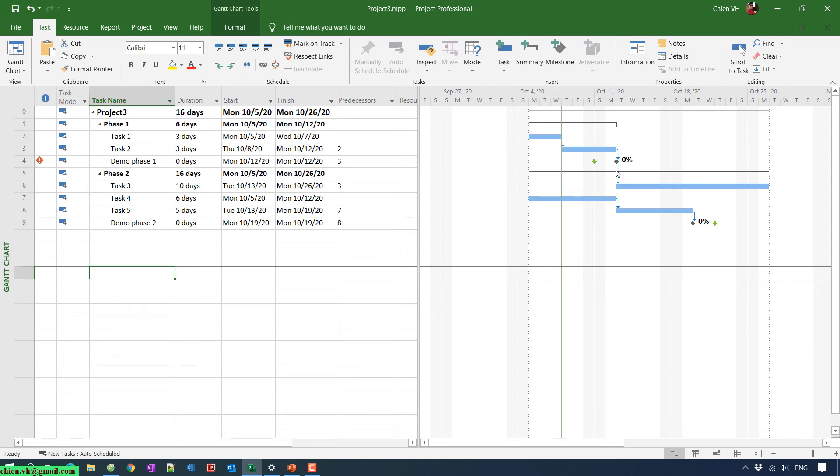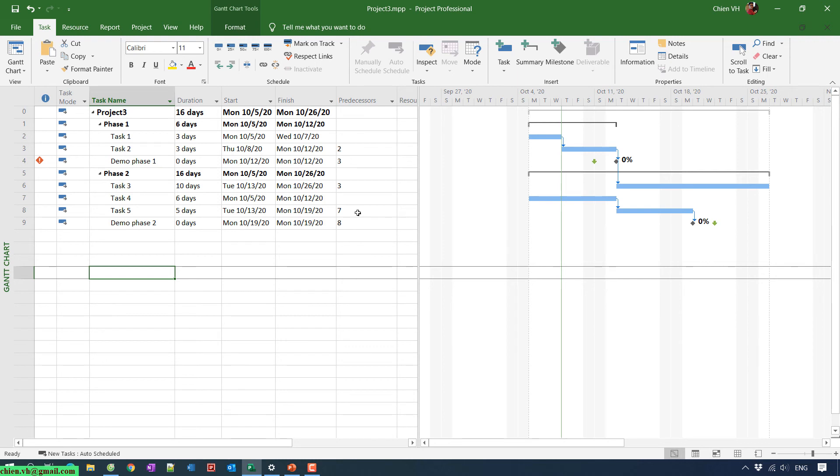So here, that means when we do some setting for the deadlines for each task or even each milestone in your project, sometimes if you have any issues for the deadline, we will have an icon in the indicator column that says that your project may be behind schedule. So that means when you see any red icon in the indicator for the project, that means your project has some issues. So you need to do some analysis first to find the root cause in your project, and then you should find the corrective action to bring your project back on track.